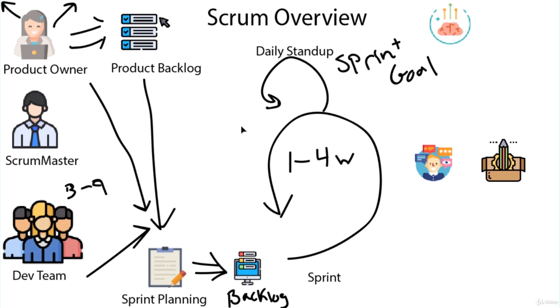And then after that, it's going to be a little bit of a status meeting. It's not supposed to be too much of that, but essentially you're going to be talking about three main things. What did you do yesterday? What are you going to try to get done today? And are there any blockers? And the blockers are going to go straight to your Scrum Master. You don't talk about them here. You just talk about the general overview here, but you don't fix them.